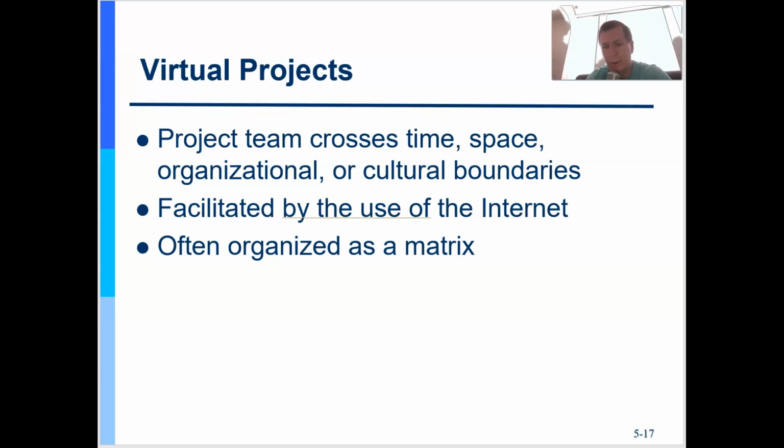I deal with virtual projects in a number of ways. One is I keep some open office hours on Zoom where I'll log in and just stay on. What that does is it lets other people, in essence, walk into my office, which is nice. All they have to do is get on if they have an issue. No set meeting time. I will just be there and we can have a conversation. I also would do virtual meetings every Friday, or every other Friday, where you bring the beverage of your choice from home or wherever you're at, a Coke, water, wine if you want, and we will talk about the last two weeks' worth of work and what's going on in your personal life.